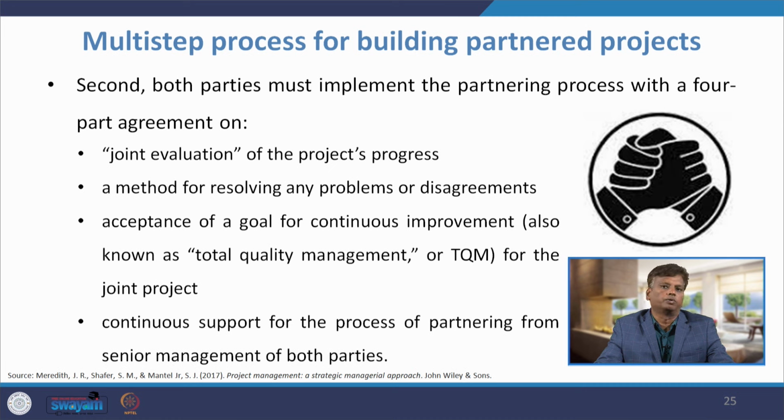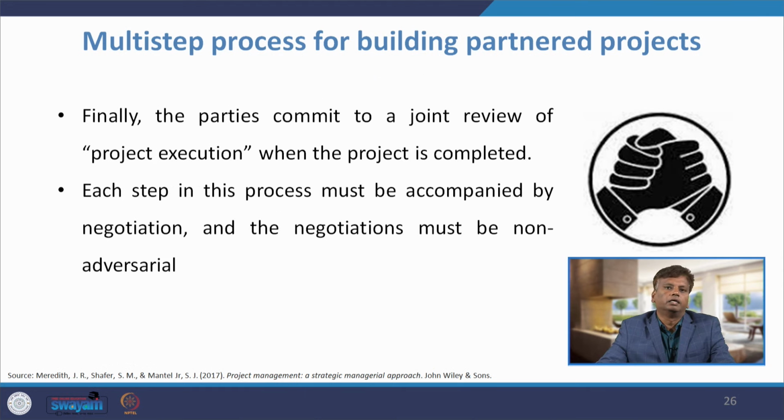Then, continuous support for the process of partnering from senior management of both the parties. So, we have to have continuous support from the senior management of both partners. Finally, the parties commit to a joint review of project execution when the project is completed. Each step in this process must be accompanied by negotiation, and the negotiation must be non-adversarial. That means there should be a win-win situation between the 2 parties who are involved in the negotiation.